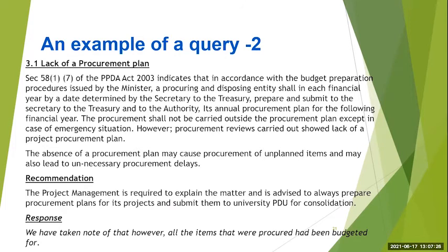as an administrator, I should have read, to make sure that I submit the necessary documentation before starting any procurement. So they wrote here that absence of a procurement plan may cause procurement of unplanned items and may also lead to unnecessary procurement delays.